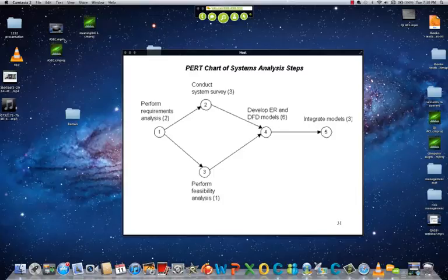And there is something called critical path here. Critical path is the longest path as defined in these weeks. If you look just at one path, basically here I have 2 paths: 1, 2, 4, 5, and the other path is 1, 3, 4, 5. So the critical path is a path for which the sum of those numbers in parentheses is a larger one. The longest path. So what is the longest path here?